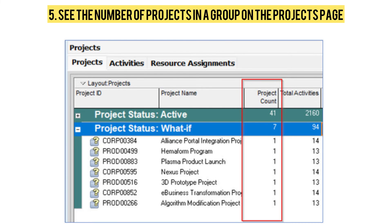The last but not the least feature: you can now see the number of projects in a group on the Projects page. When your view of the Projects page is grouped, you can add the Project Count column to see how many projects are in each group.